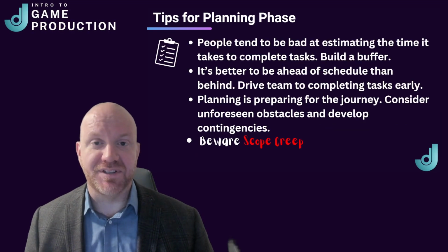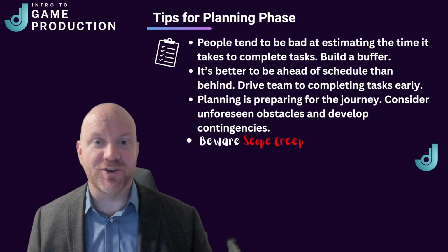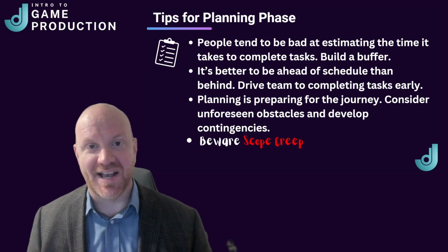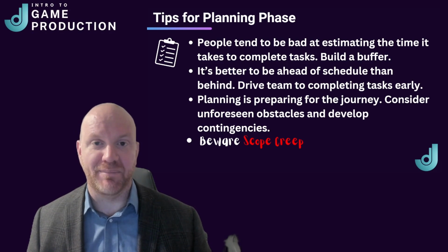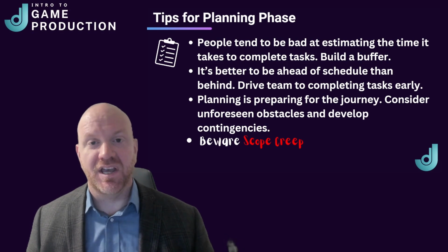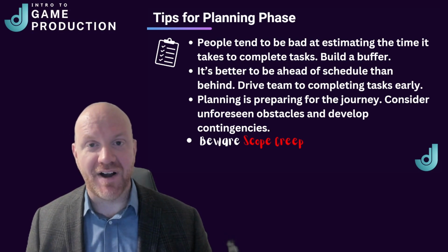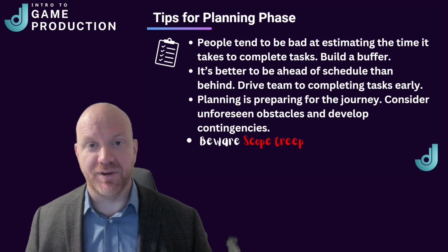But I want to leave this video with just a few tips to help you with the planning phase. The first one is that people tend to be pretty bad at estimating how long tasks should take. And in most cases, they tend to underestimate. So my recommendation is to build a little bit of buffer into each of the phases. If someone tells you something's going to take them 4 weeks, make sure that you give yourself 5. You just always want to have a little bit of buffer to work with your project.